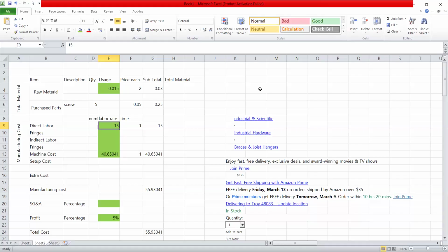There are two different things that I want to explain a little bit. This is the estimate for the cost of the part. But when you quote this to the supplier, there will be a lot of things that need to be added. As Surti Bhai explained, SG&A normally runs between 6 to 8%. Profit normally runs between 15% to 20%. Total should be around 25%. That's a general rule of thumb.